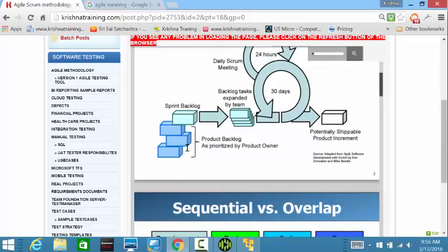So when they say sprint one, requirement one should be completed for team A. In sprint one of team B, requirement 13 should be completed. Requirement one and requirement 13 go together: requirement one is for the UI portion, requirement 13 is for the backend portion. Clear? So they will be dividing like this into 10 sprints for team A and another 10 sprints for team B, which would take 20 weeks. Each requirement would have 4 development people working, and QA people working.